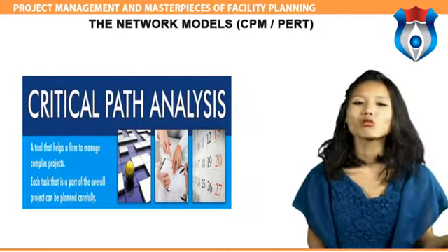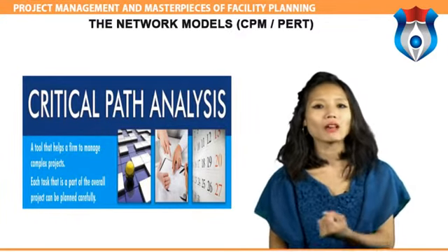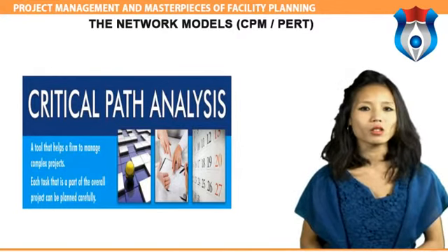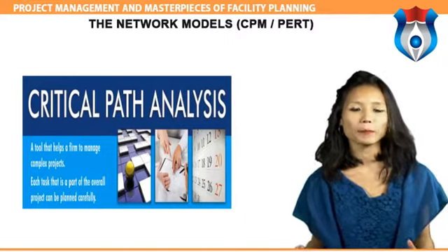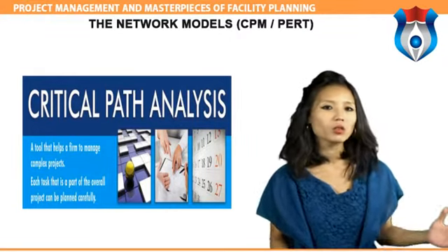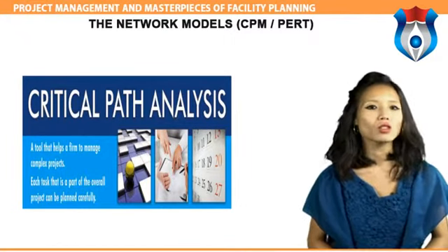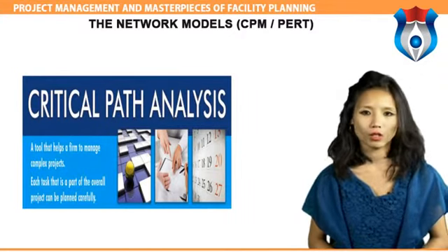Then the CPA is drawn up based on the dependencies such as the availability of labor and other resources, lead times for delivery of materials and other services, and seasonal factors such as dry weather required in a building project. Once the CPA is drawn up, it is possible to see the critical path itself. This is a route through the CPA which has no spare time, called float or slack, in any of the activities.